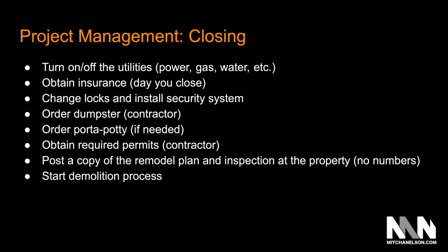Change locks and install a security system. Order a dumpster. I have my contractors do that. Order a porta potty. I have my contractors do that if it's needed. A lot of times we'll just leave the old toilet in place until we're ready to replace it with the new toilet. Obtain required permits. I have my contractor do that, so it saves me time.